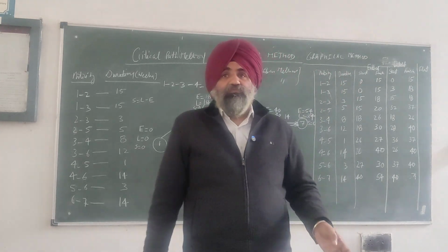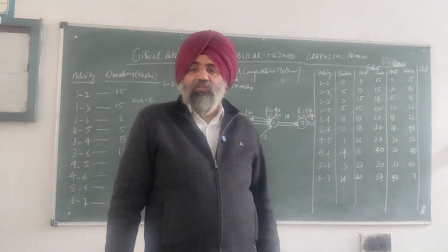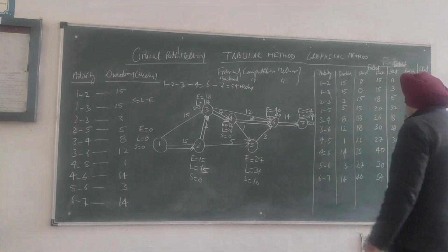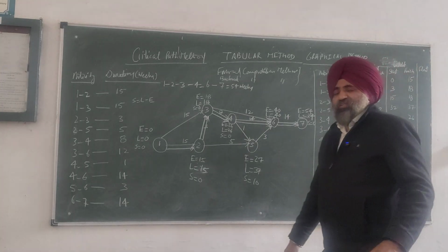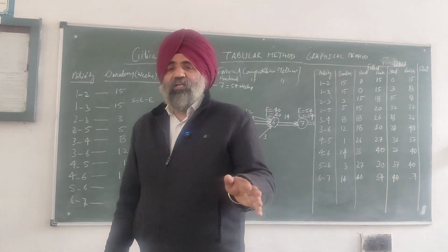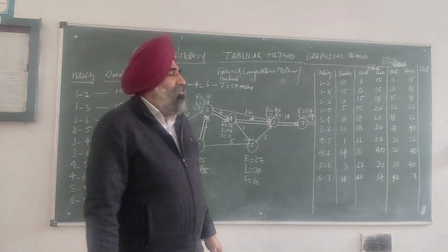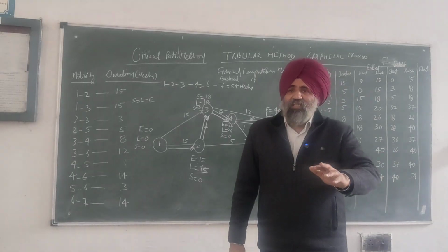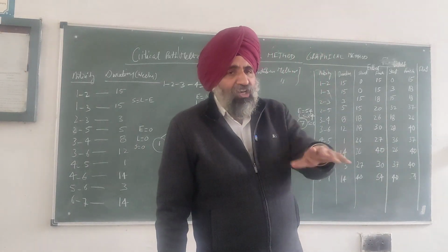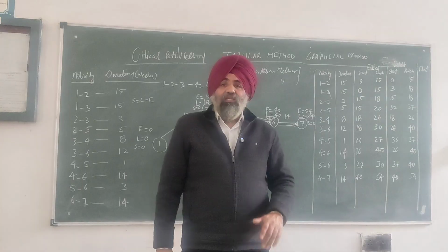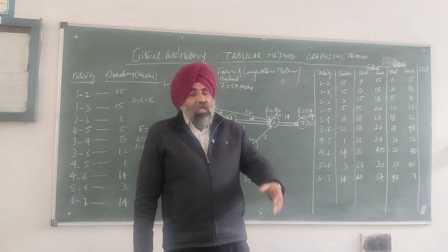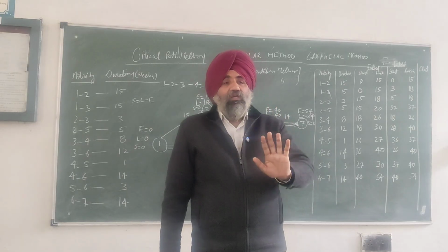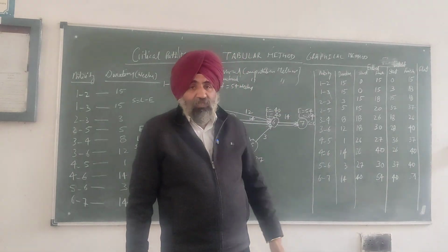Sometimes we have been given that you have to complete the project by 50 weeks. In that case, this value will be less. Clear? So, if the value is 0, this is a critical activity. This is the critical one, you cannot delay the activity. If the value is positive, say 1, it means 1 week, you can delay the activity by 1 week. If the value is minus 1, we are already getting late, which means we have to cover up 1 week in our subsequent activities.